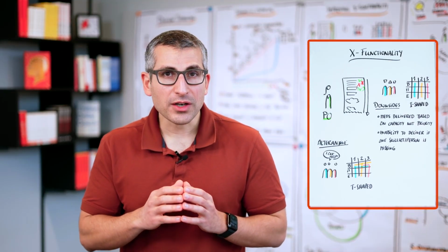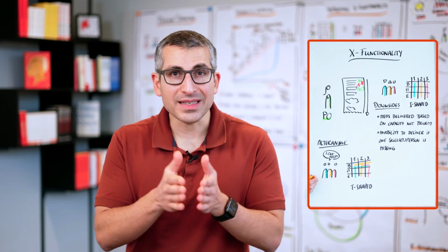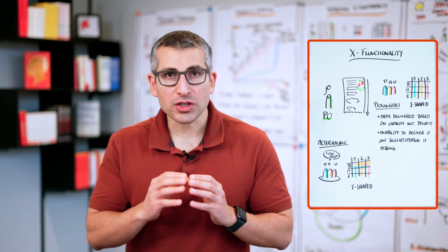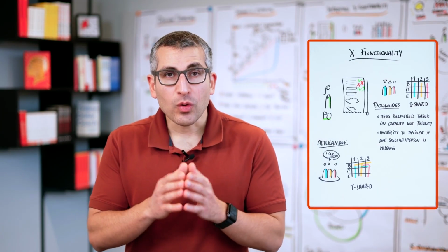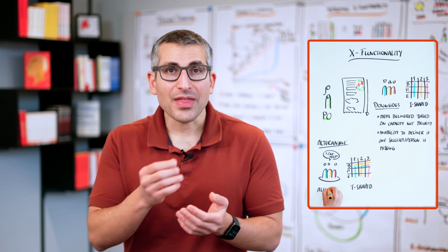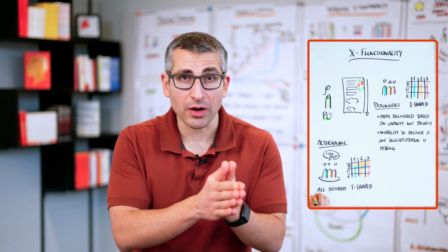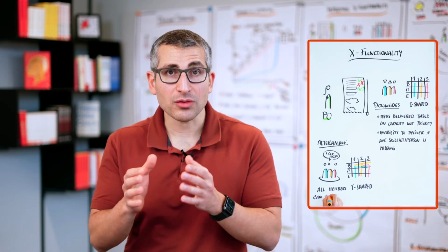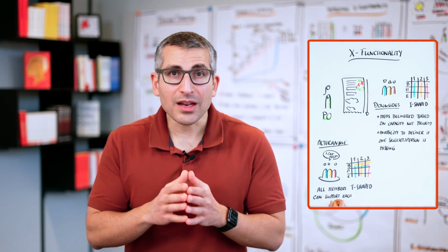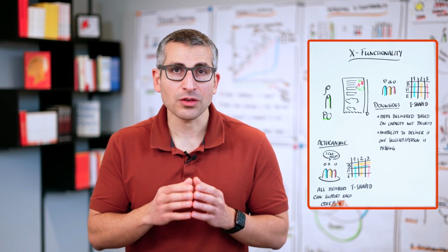So a true cross-functional team is not a group of people where all skills exist in order to move an item to done. A true cross-functional team is a team where all members of that team have such a broad level of skills that they can not only support each other and move items based on their priorities from the product backlog into the sprint backlog, but also support each other to the extent that if one team member is missing, they can still deliver value for customers.